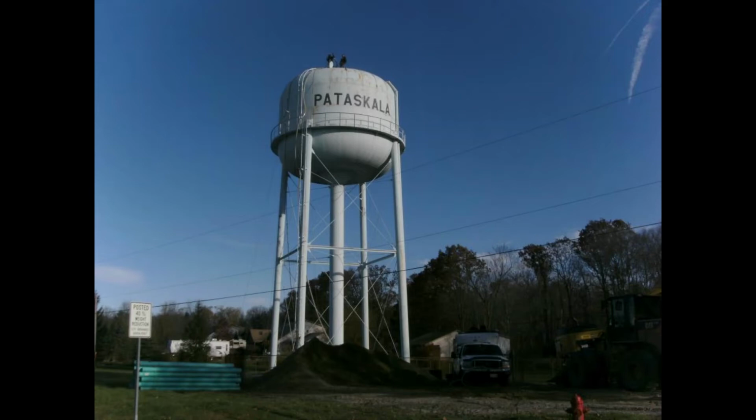So the red circle is where the plant is now. With that upgrade, eventually we would need a new trunk line to get from the Headley Mills corridor to the new Creek Road lift station. Without a new trunk line, we're trying to find the end of a subdivision somewhere and cram everything into an existing 8-inch line, and everything's a bunch of bottlenecks. So the good news is, down Township Road, we don't have a main sewer trunk line right there. Everything comes from the sides. So that would be a pretty straight shot to grab things around Headley Mills Tower and run a new trunk line to Creek Road lift station.